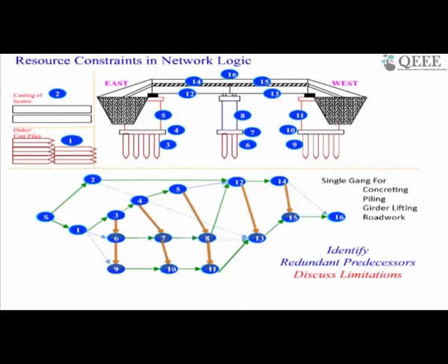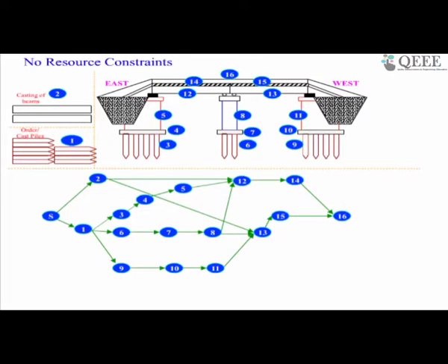This becomes a problem because I'm constrained by saying one resource. It's built into the CPM. Whereas if I had left it as in the earlier case, my resource constraint is not explicitly in the CPM. If my software models it as a resource constraint, then as I change the number of resources, the whole duration will be adjusted based on resource availability.